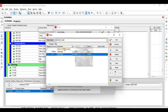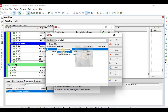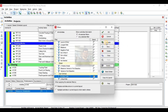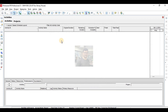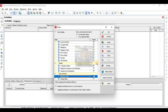It is showing civil activities including finishing activities. If I want to make it AND — go to Modify — then it will show me nothing, because no activities have both civil and finishing activity codes assigned. Care should be taken here.